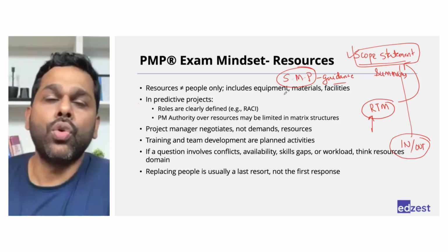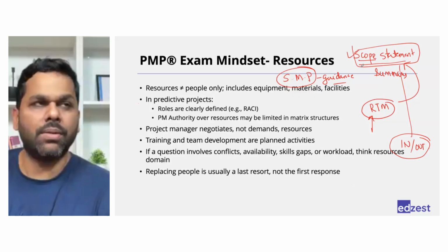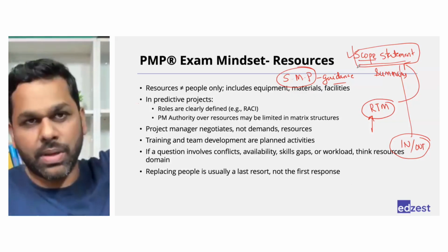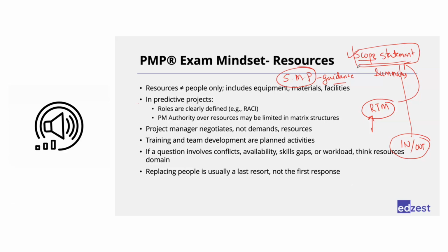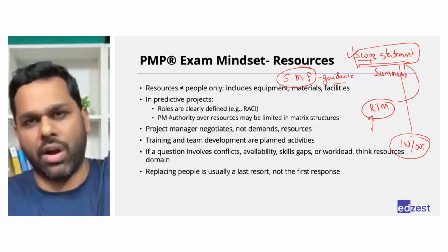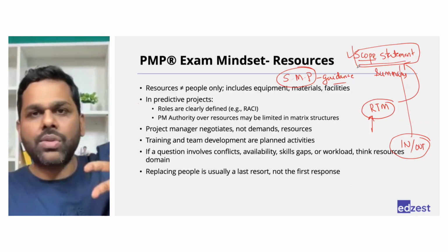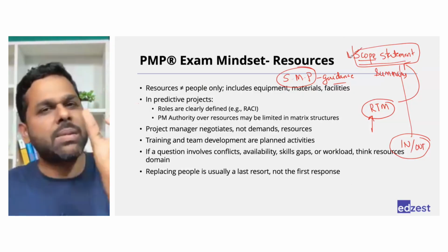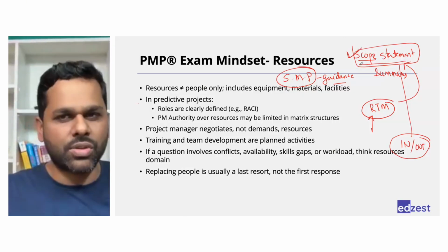Financial things will be used to decide the scope. See, what do we mean by financial thing? Maybe that, okay, $500,000 will be used in this particular deliverable. But then that in itself is not a deliverable. It has only helped me in understanding whether it should be a deliverable or not. And the minute I have understood that yes, this will be a deliverable, I'll add it into the scope statement. So that money part or amount will not be mentioned in the scope statement.